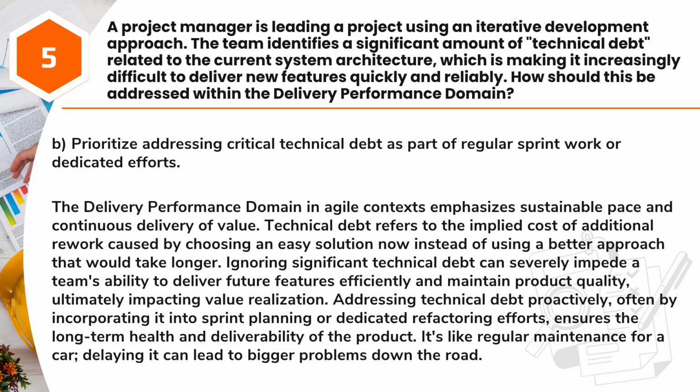Answer: B. Prioritize addressing critical technical debt as part of regular sprint work or dedicated efforts. The delivery performance domain in Agile contexts emphasizes sustainable pace and continuous delivery of value. Technical debt refers to the implied cost of additional rework caused by choosing an easy solution now instead of using a better approach that would take longer.